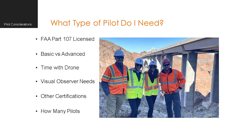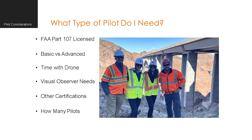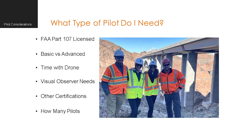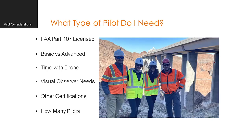What type of pilots do we need? FAA Part 107 licensed drone pilots are required — one for every drone in the air. We use a basic versus advanced framework internally, which is also used in Canada for their licensing program. The question is: what types of maneuvers are we doing on the bridge, and do I need someone more advanced? Time on the drone is important — the pilot needs to understand the drone before flying it at a bridge site. A visual observer is always important to watch the pilot and the surroundings, and in bridge inspection, the bridge inspector should be a team leader and certified.